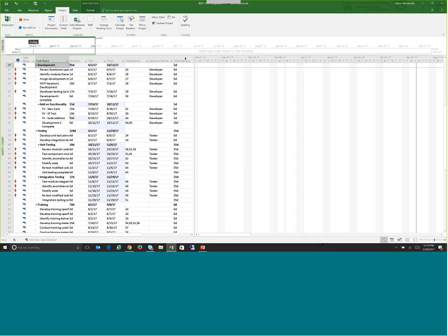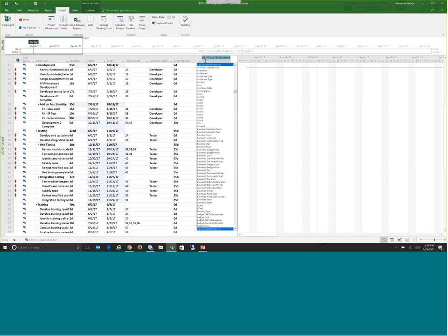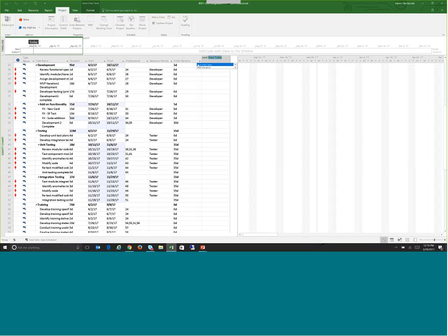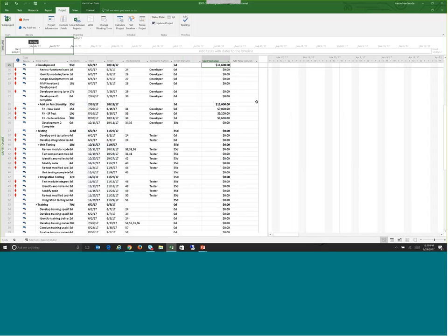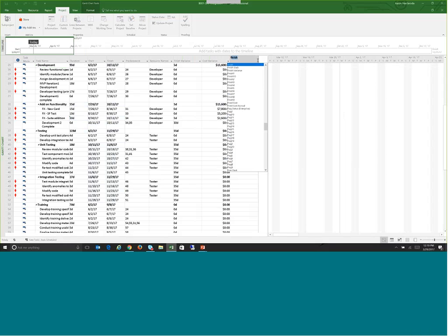That way, when you're looking at things like finish variance, cost variance, basically anything that has a variance in the name. So if I want to look at cost variance, the project is always going to track that against the original baseline. Now if I wanted to view what baseline 1 or baseline 2 had? For things like finish, I can see over here I have the current finish date in here.